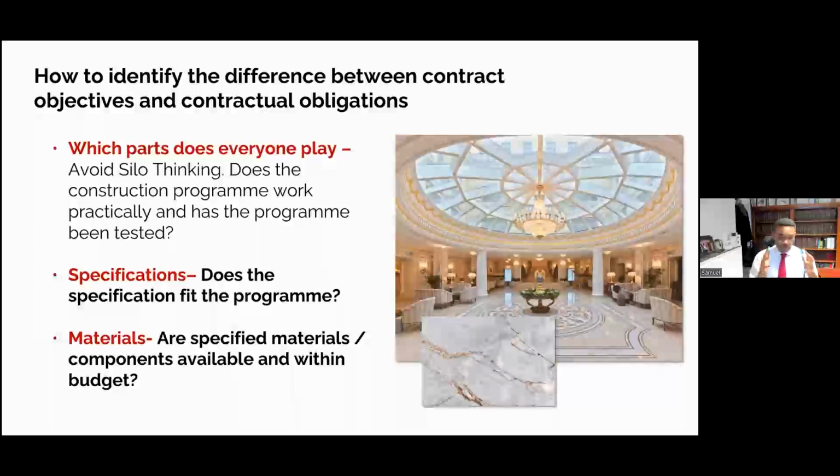The diamond drill itself requires a substantial amount of water going with the diamond drill because it's red hot. So what you then find in such a situation is that whilst you're diamond cutting literally hundreds of holes through already cast concrete structures, in essence, very few other trades can come behind. You all of a sudden have held up everything that is supposed to be coming behind.